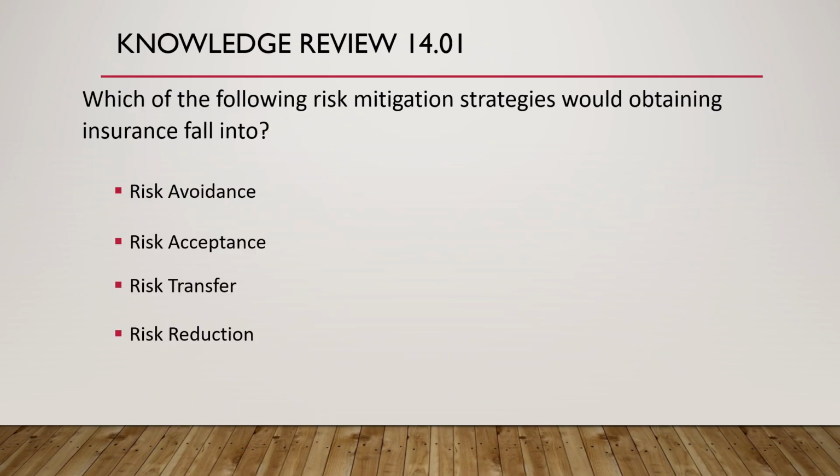Time for a quick knowledge review. Which of the following risk mitigation strategies would obtaining insurance fall into? Risk avoidance, risk acceptance, risk transfer, or risk reduction? The answer to this question is risk transfer.